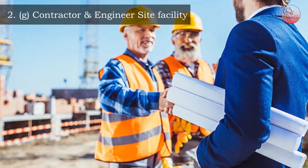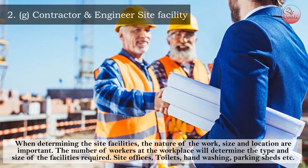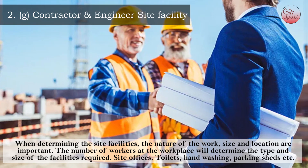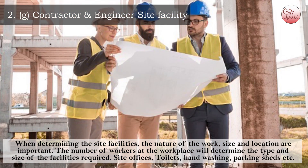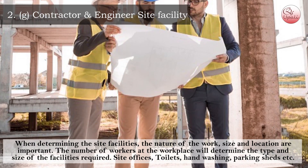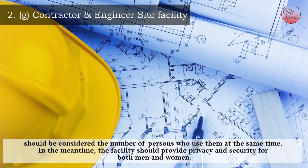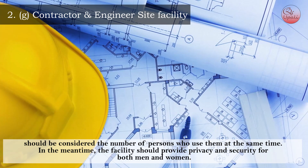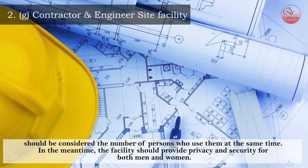G) Contractor and Engineer Site Facility. When determining the site facilities, the nature of the work, size, and location are important. The number of workers at the workplace will determine the type and size of the facilities required. Site offices, toilets, hand washing, parking sheds, etc. should be considered based on the number of persons who use them at the same time. The facility should also provide privacy and security for both men and women.